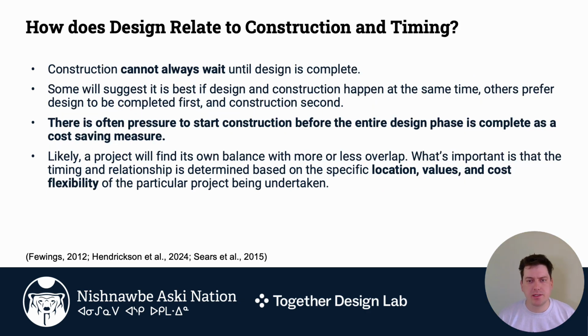There's a thing we need to know, or a note we need to make here about time and sequencing. When we get to the cost control model coming up, you'll see how with cost control, if that were the only value that we were considering, it would be best to have totally designed the building before we start doing any ordering or construction or site prep, because before any of those things take place is when you have the most control over cost.